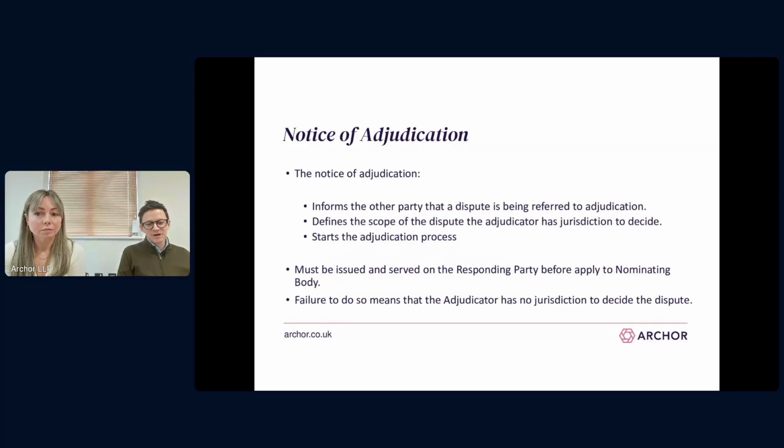So if you want to refer a dispute that's, say, 30 different variations and you only put 25 in the notice, you can't then rescue that in the referral by adding the 5 that you missed off. If that's really what you want to do at that point, the best thing might be to let the notice lapse or pull it and start again.